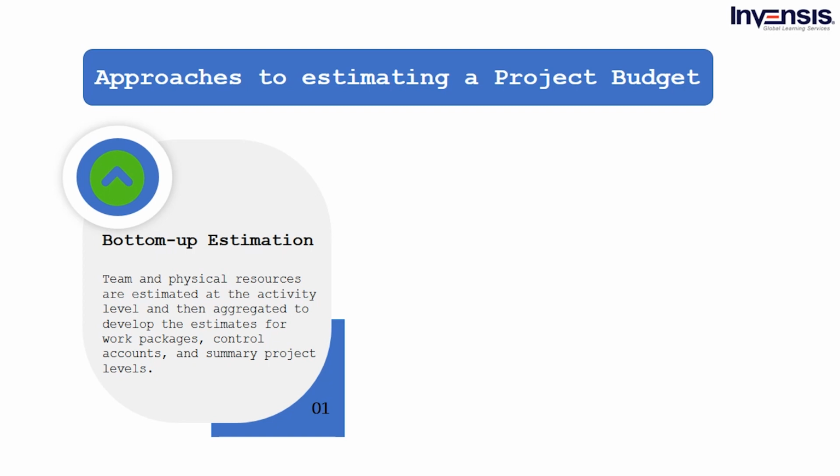The disadvantage of the bottom-up technique is that getting down to the tiniest aspect of a project takes a long time. Furthermore, according to our internal study, 71% of tasks are produced after the project start date. As a result, project needs can alter even before the ink on your statement of work has dried. Also, because it's so granular, you can experience inflation affecting the cost of your estimations at some point.